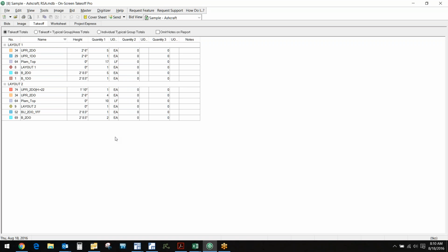One of the things that has changed in our industry, that I suspect you guys would agree with, is it used to be that we'd get a job and then we'd engineer it all up. We'd do submittals, red lines if you're doing that kind of bid work, and then we'd have plenty of time to order our materials and all this stuff. Today, there are so many exotic laminates and different kinds of stuff with long lead times, and everything is special, and the lead times that we have to be able to do this stuff are so short that I have customers that are literally saying, how can I start ordering materials before I even engineer? Does that make sense?